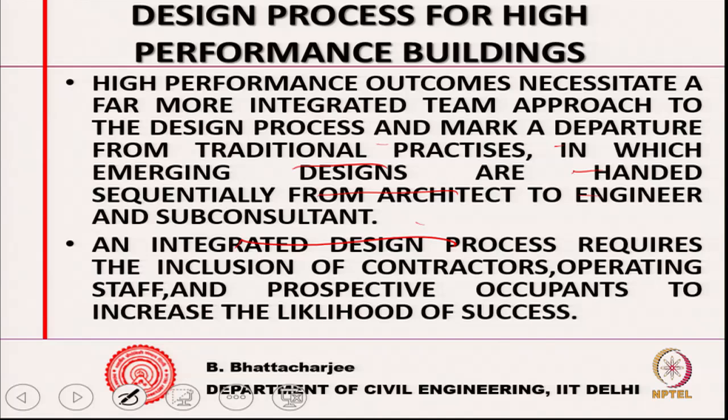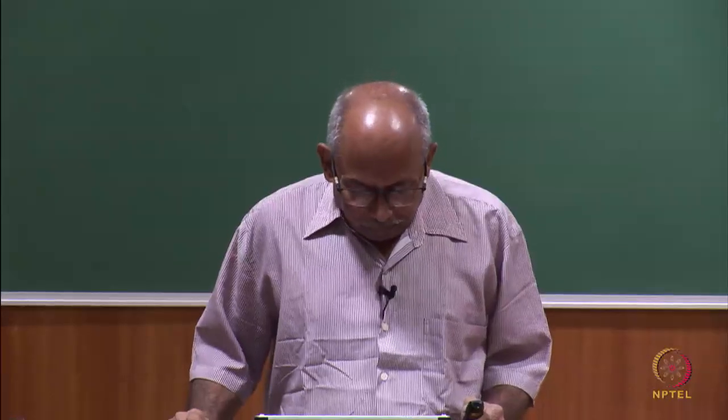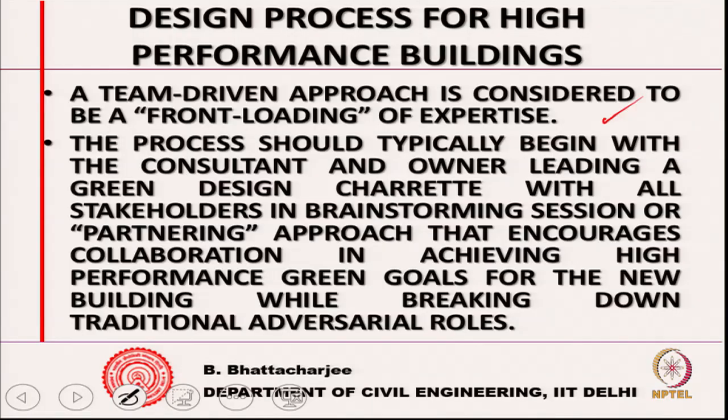So, such an integrated design process means you do all design in one go, integrated, right, with inclusion of even contractors and operating staff and everyone to increase the likelihood of success, right. So, a team driven approach is considered to be a front loading of expertise.